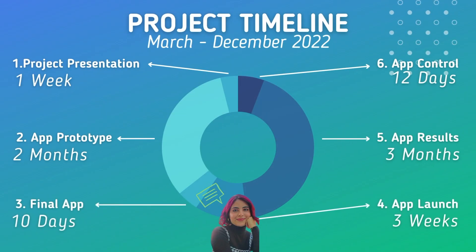We have established six stages to execute our project. First, a project presentation to our stakeholders, which will last one week. Second, the app prototype development, which we estimate will last two months. After that, we want to develop the final app, which will take approximately ten days. Then, the app launch, which will take around three weeks. After the app has been launched, we're going to measure its results over around three months. And lastly, we're going to develop control or improvement strategies over the next twelve days after that.